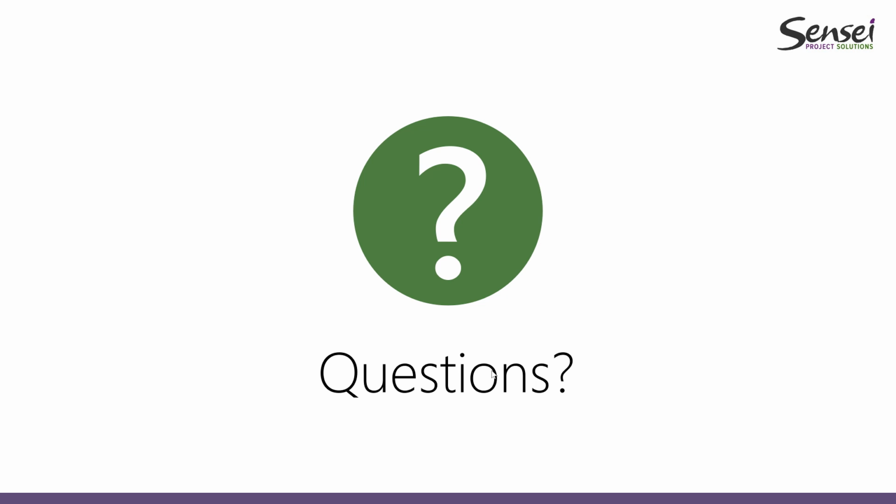We do have another question here that comes from Susan. She asks how frequently we should be setting the status date for our projects. And our recommendation is that you set the status date and do all of your planning and revisioning weekly. So what we do here at Sensei is that on Friday, end of the day, we submit all of our timesheets, and then we do the revision of our schedules. That's the way we work with that.